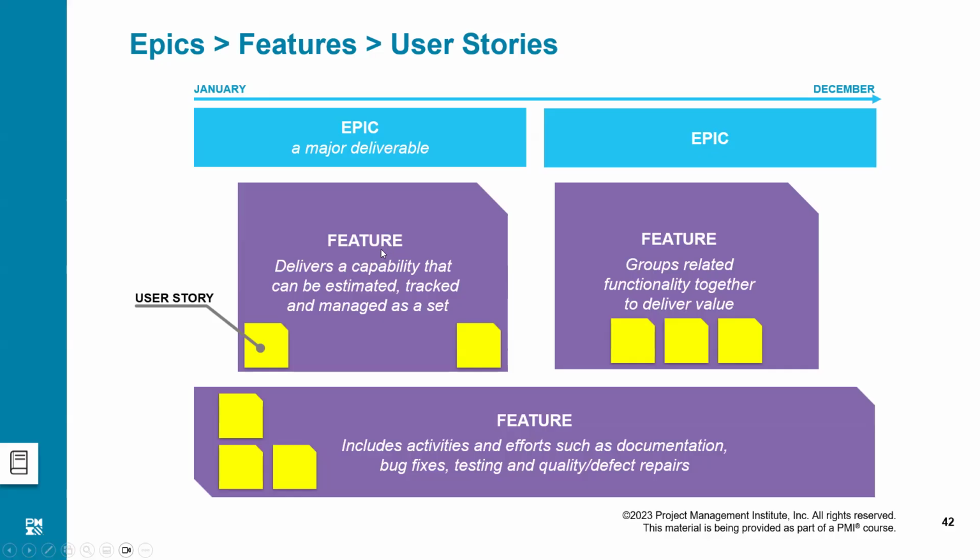So classically speaking, the product backlog must only have user stories, which are much smaller than the iteration size. If our iteration size is 2 weeks, then there should be no work which is larger than a couple of days.